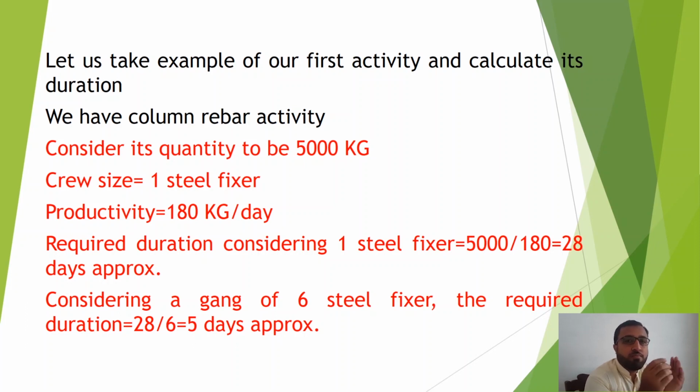Those may be the space requirements. Space is such that we cannot put 50 steel fixers, so we can only put 25 or 30. So based on that, we have to give a duration considering resource and time both. So this thing will come with experience.